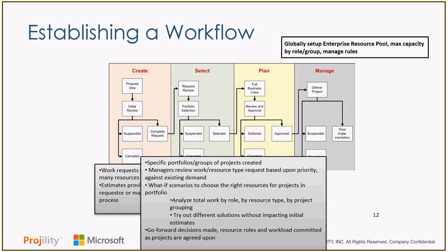We want the ability to do what we call what-if scenarios, so we can go in and understand if we have the right resources or do we have not enough resources in a certain category. And we want to be able to analyze the total work by role so we can look at resources and types. Do I have shortfalls or do I have deficits in certain kinds of resources? Then we want to try out different solutions without impacting the actual work going on in our portfolio. We want to say, what if I brought 3 business analysts in from the outside, or what if I shifted some work around? So we need some tools and some analytics to do that.